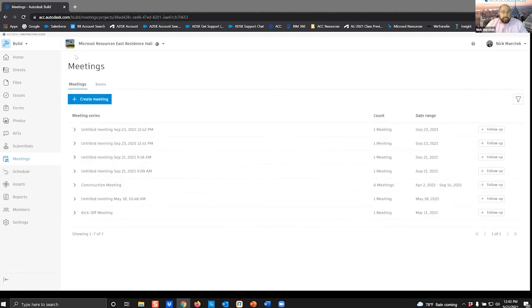After the meeting minutes have been distributed, let's say in the following week or the following month, when you need to create a new agenda for the next meeting, I can actually come over here and click on follow up. And this will automatically pull all of the open items over as a starting point from that previous meeting agenda, and anything that was closed will just drop off. So you're not reinventing the wheel every time you go to create a meeting agenda.